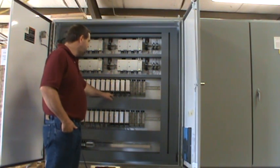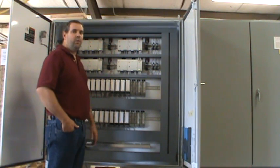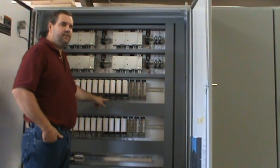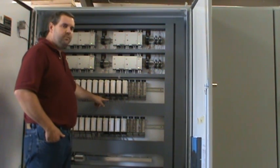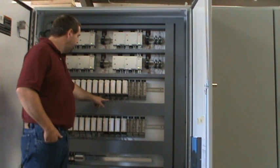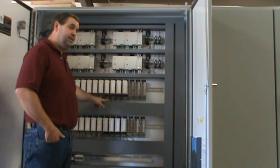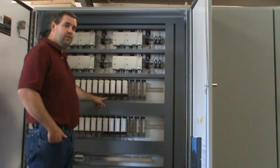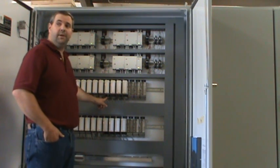Basically, I wrote a small program for a Slick 504. I would terminate the opposite end of this cable onto a terminal strip, and from that terminal strip I wired it to an output card. When I fired an output, I would expect to see a corresponding input. I went through each pin, one through 25, checking the color code and continuity that way.